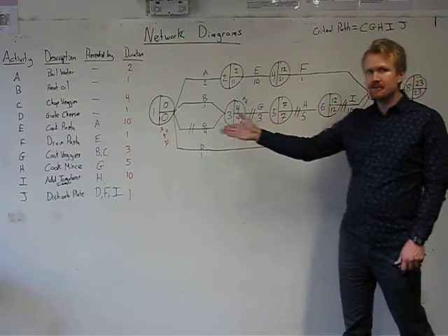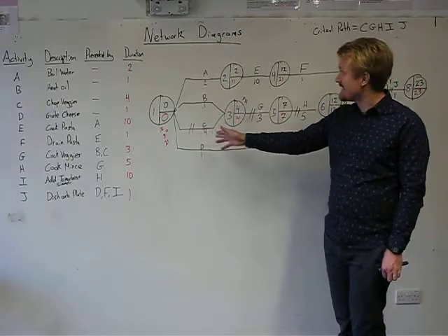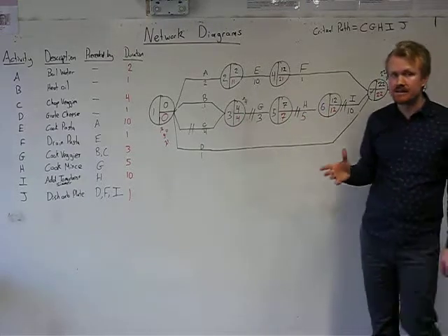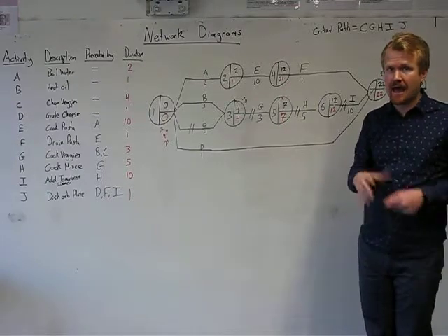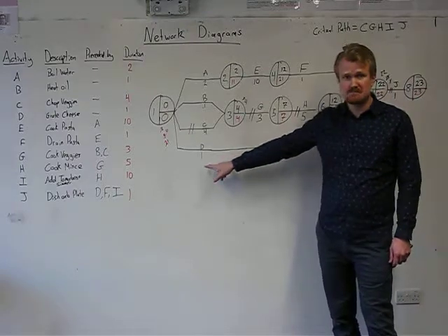We must do those tasks in that order without any delay, because if we delay any of those tasks, we will end up taking longer than 23 minutes to cook this spag bowl. So by definition, tasks on the critical path have no float time. But you can look at other tasks, and they should have some element of float.